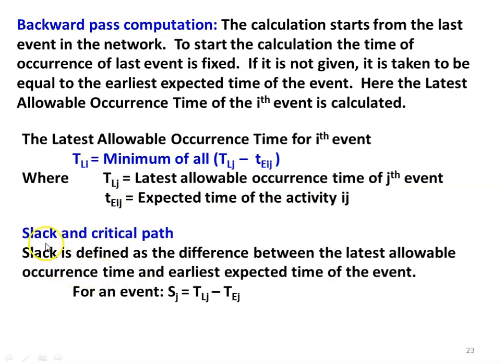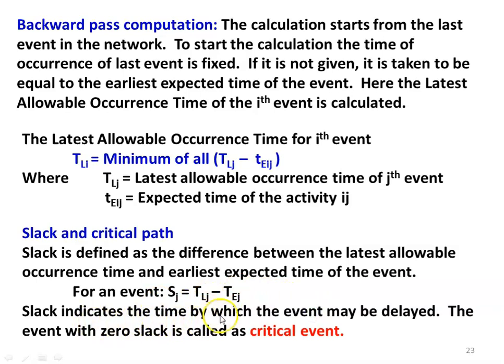After these two calculations, we calculate the slack and the critical path. The slack is defined as the difference between the latest allowable occurrence time and the earliest expected time of the event: S_j equals TL_j minus TE_j. The slack indicates the time by which the event can be delayed. If the slack equals 5, we can delay the activity by 5 days. If the slack equals 0, you cannot delay the event — you have to complete the event in the stipulated time. The event with zero slack is called a critical event.